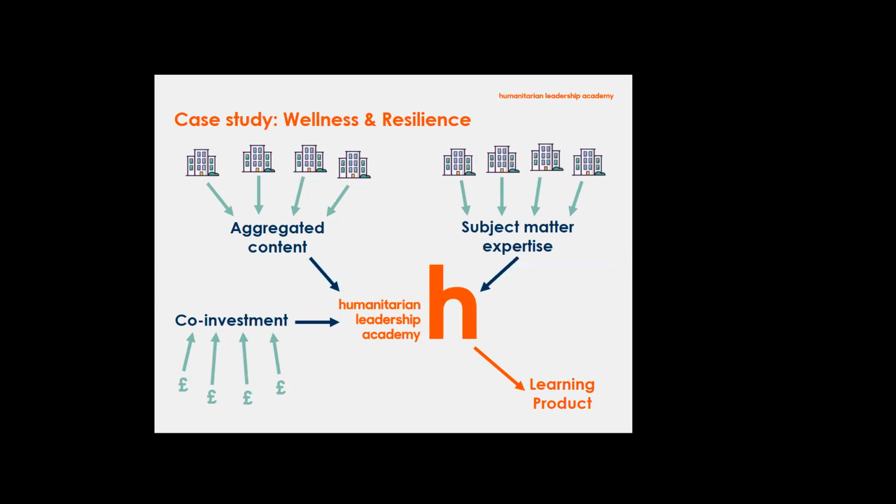In terms of other challenges, obviously working in this way is a very timely process. It takes a lot longer when you have 14 organizations involved in decision making. There's also issues around the buy-in and ownership to ensure that if you do get 14 people, that they actually are then actively engaged rather than sitting on the sidelines. So we do a lot of work at the beginning to ensure that partners really understand the expectations and write really clear terms of reference to explain what is the expectation on each person.